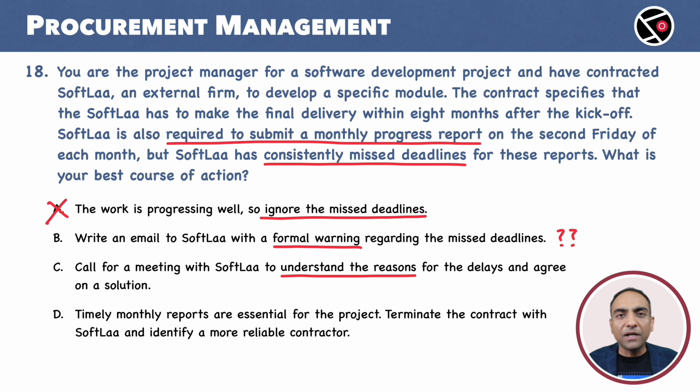Negotiations will help. The supplier originally might be seeking a payment that is 6 months early, but might be willing to offer some discount even for a payment that is made 3 months earlier. Negotiations will help to find alternatives. Win-win for both sides. This is indeed a good choice.